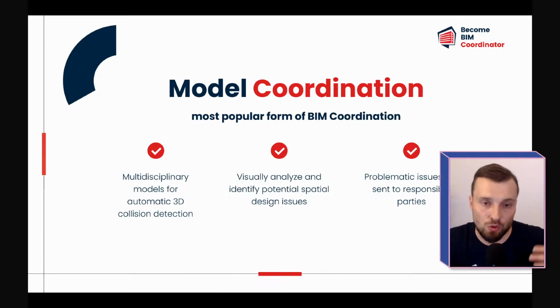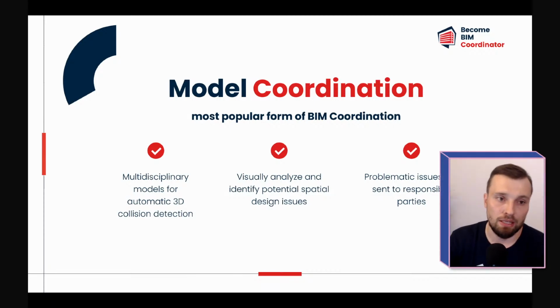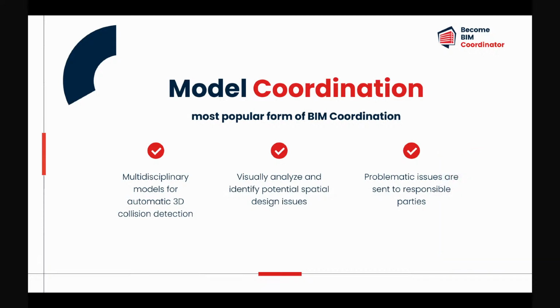Then, using this software, we automatically check clashes, and all these clashes can be reviewed, commented on, we can assign people to these clashes, choose the responsible parties and resolve the issues. And afterwards, the reports of the clashes that are created can be shared with people who are involved, for example, in coordination meetings, and during these coordination meetings, resolve critical issues.